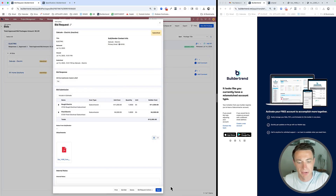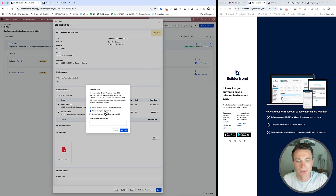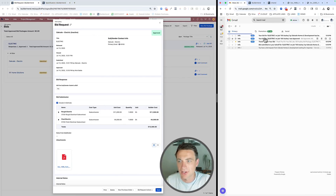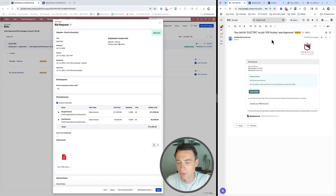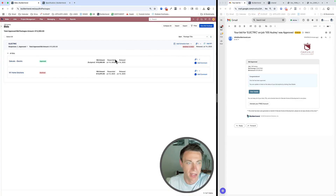In any case, I'm going to take a bid and set it to approve. When I do, you can notify the winner, you can notify the losers, and we can of course create a purchase order — which is exactly what I'll do in the follow-up video. Let me just approve this. From the contractor side of things, they'll see 'Your bid was approved' — and then we have the one that's been declined. One email says approved, one says declined. You don't have to notify your vendors, but now that it's been approved, bidding is closed and I can do some other stuff that I'll show in a separate video.